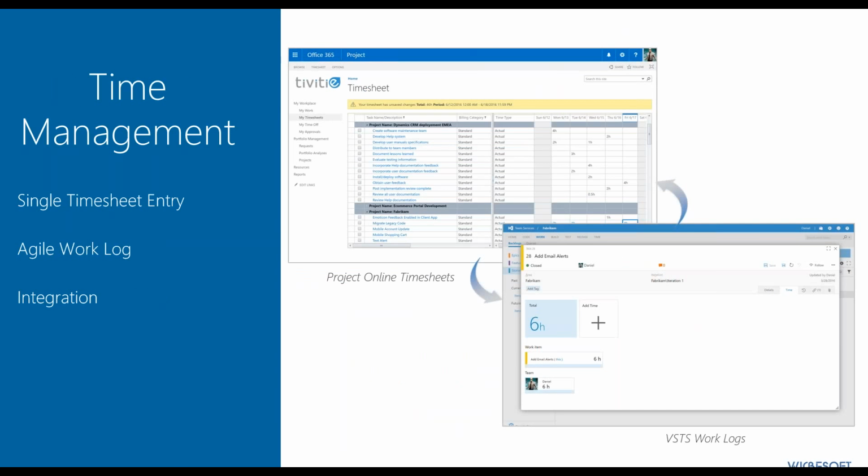Also, time reporting. One of the things that happens when you have different solutions is oftentimes teams have to do duplicate entry of information. One to feed their Agile tool, in this case, and one to do a timesheet or a status report to the PMO or to the rest of the organization. In this connected model, which is enabled by being in the cloud, you can do these things in your tool of choice, like reporting actual time, and have it feed a timesheet in Project Online without having to enter that data in two separate places. These are some of the visions of the interoperability and the ease of having cloud tools talk to one another.